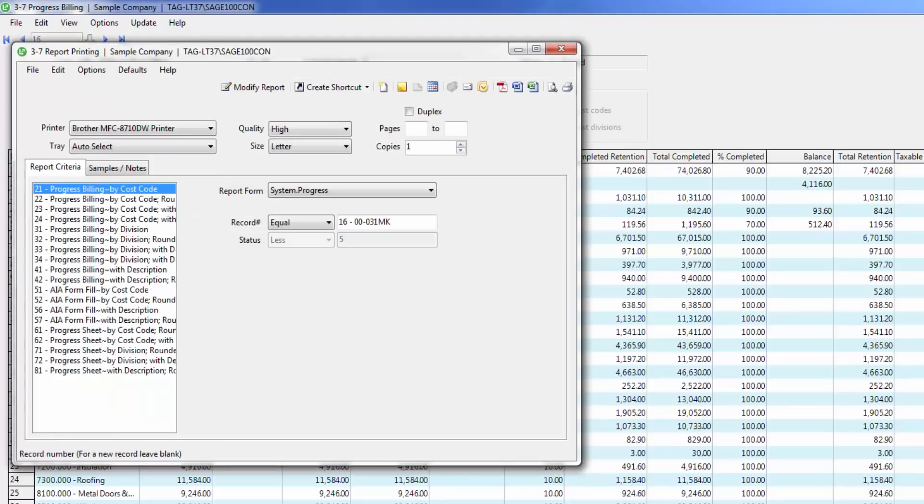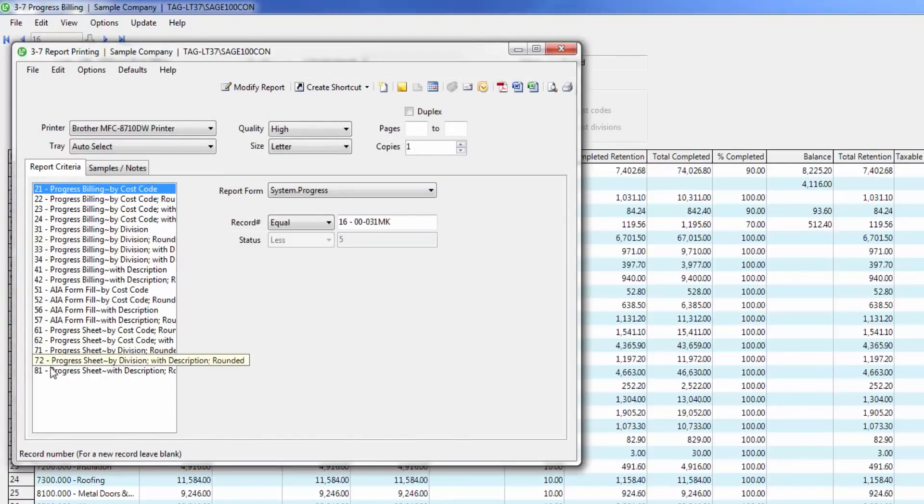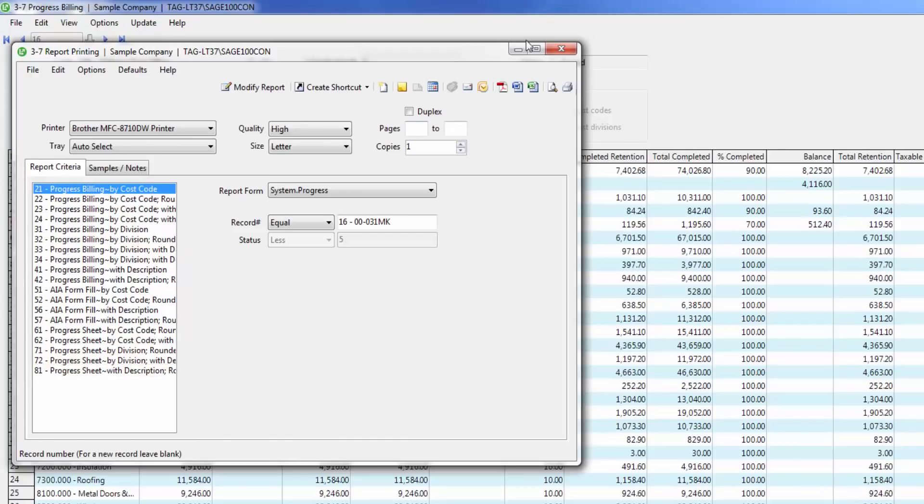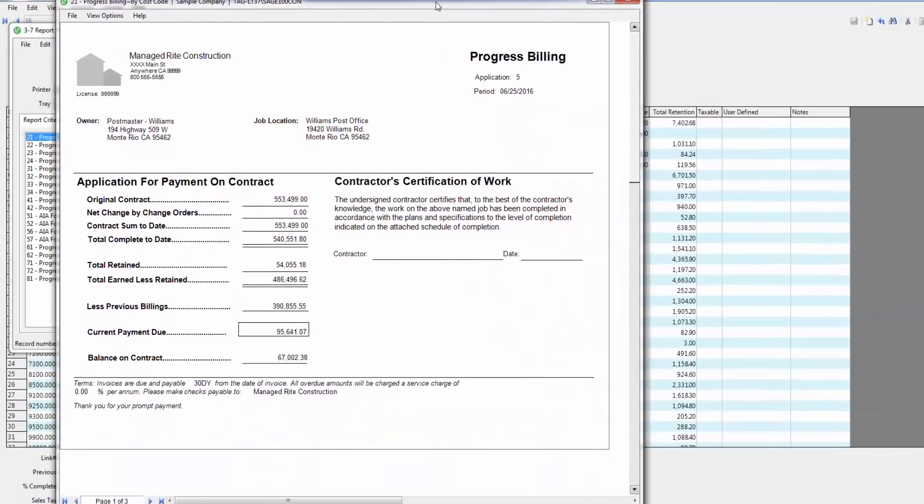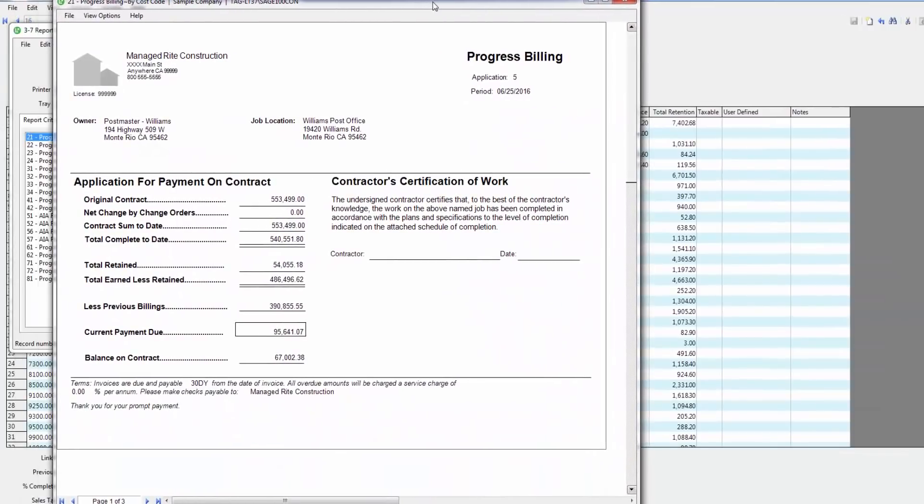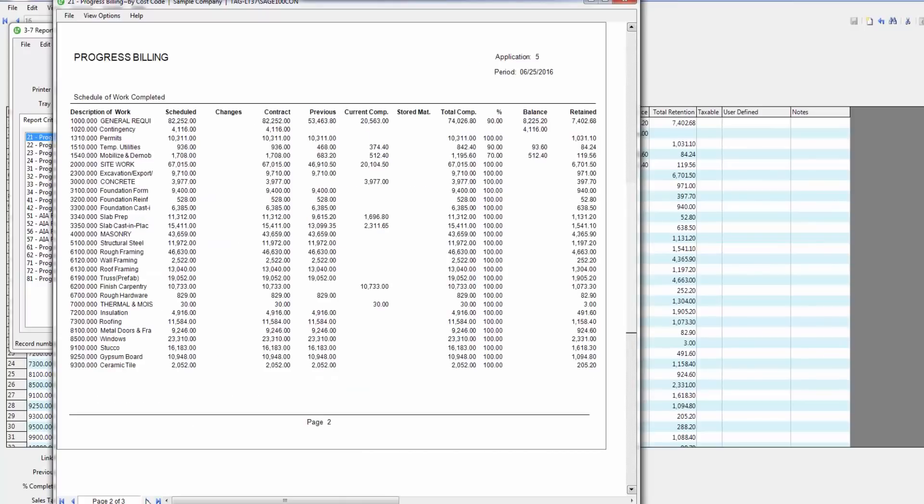When I hit the print button, you'll notice I have various types of progress billing formats that I can use. This example is an AIA type progress billing with my cover page with the contract summary and the secondary pages that are showing my schedule of work.